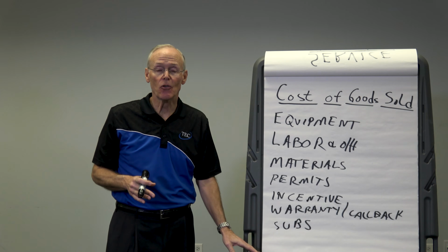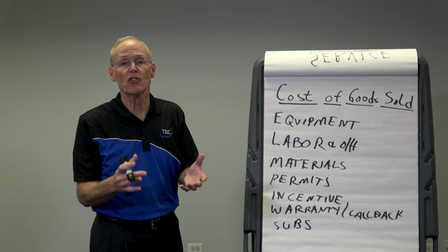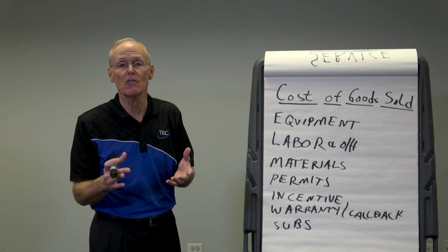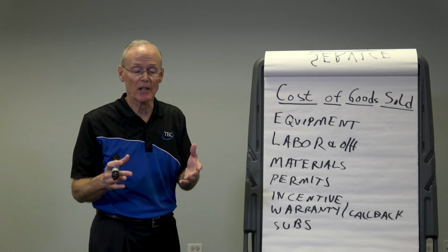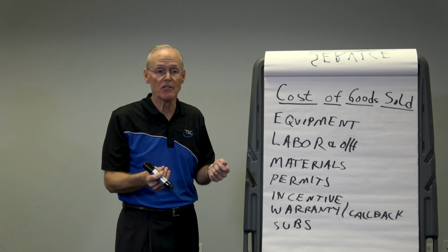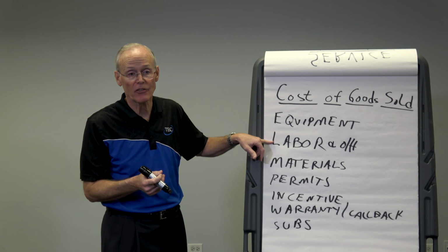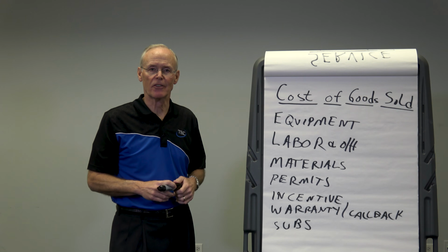If you have that under overhead because you take a draw or you take when there's profit, then you're skewing the cost, those percentages that you need to calculate the job. So if you as the owner are doing this, or the project manager is actually working on site, turning wrenches, then you would put his costs in here. Anything else? We're getting down to the nitty gritty, but these are good topics.